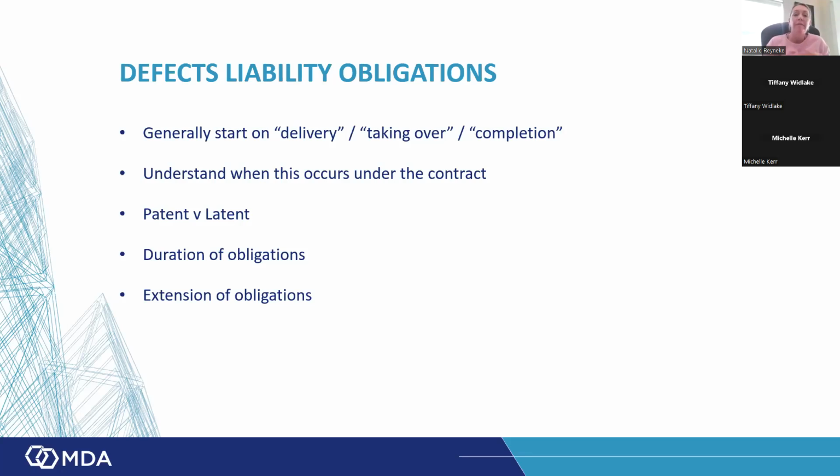So I think from that perspective, as an employer, you need to make sure that if you have defects liability and latent defects liability periods, and then there's requirements in terms of operations and maintenance, that if you expect your contractor to come back and fix his mistakes, that you have to on your side also comply with your maintenance and operations obligations.